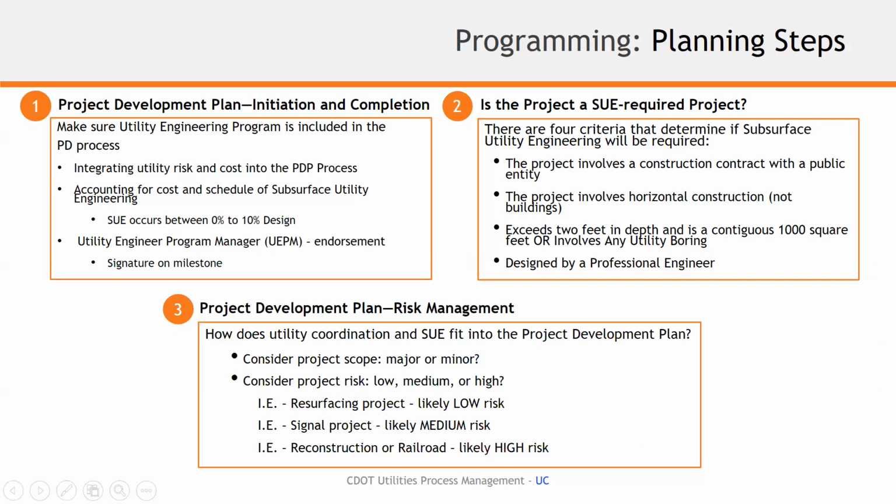And you really, step 2, all the steps are important, but if you determine right out of the gate that it's a SUE required project, it certainly sets in motion the things that Rob spoke about. Do you have to hire consultants? Do you have to have a SUE investigation done? Do you have to go through the utility coordination process?